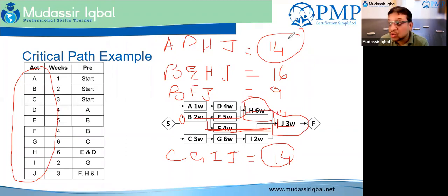So the 2 weeks of delay can be used on A or D. Let's say we took some liberty on activity A and did it in 3 weeks. Now you have two critical paths on your project, because if activity D is delayed for 1 week, your project will be delayed for 1 week.